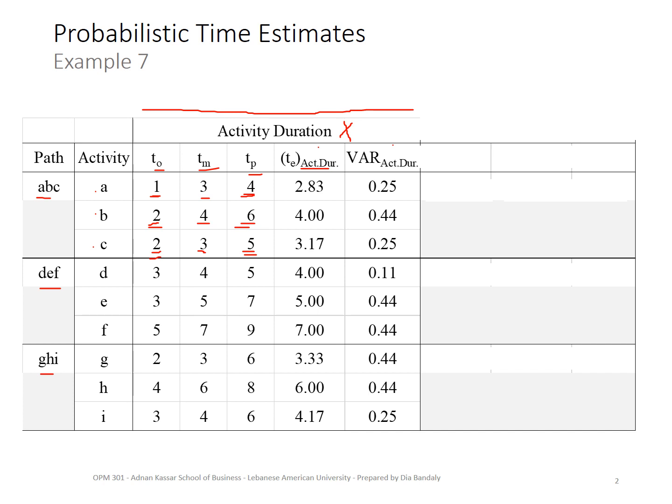Okay, now that we have found for every activity the expected duration and the variance of this duration, I'm able to find the path duration metrics. First, I need the expected value of every path duration, and I need the variance, not because I like the variance, but because ultimately I need the standard deviation of the path duration, again for reasons that I will clarify later.